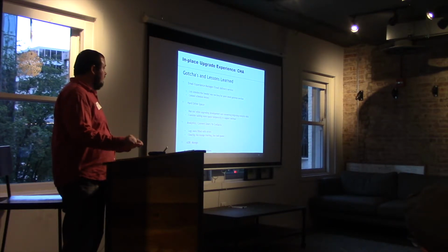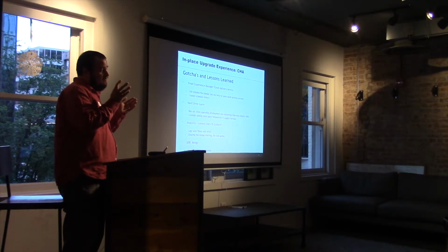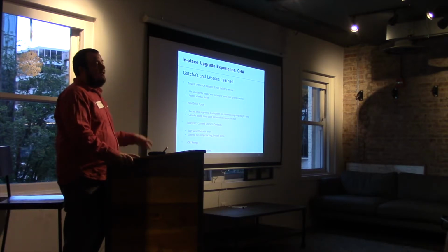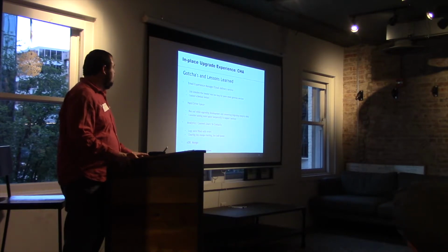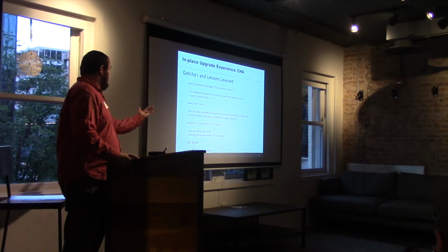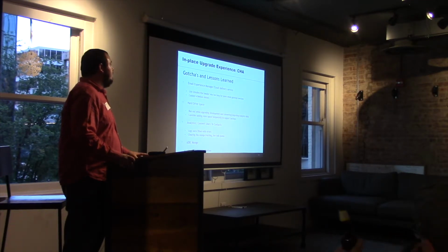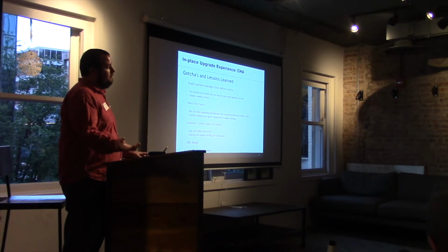Hard drive space, something you definitely want to consider, especially if you're going from versions earlier than 7. You're going to have a lot of steps if you're doing the in-place upgrade. You want to make sure you have plenty of hard drive space for those backups. It's easy to run out of space because of all the database and file backups, especially if you have a lot of analytics information in your databases. So some of the bullet points I have here: we ran out of space while upgrading the development environment and migrating analytics data, and consider adding more space temporarily to support more backups.